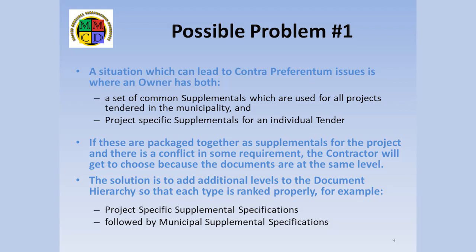Without changes to the contract documents, this situation results in a contra preferentum situation, where the contractor gets to choose. If an owner has both common and project-specific supplementaries, the MMCD Association recommends that additional lines be added to the GC 2.2.4 hierarchy to ensure that the project-specific supplementaries override the common ones. Naturally, this would be needed for each class of documents where the conflict might occur — general conditions, specs, or drawings. Of course, a better solution is to carefully screen both the common supplementaries and the project-specific supplementaries to eliminate conflicts at the time the tendering documents are being assembled.